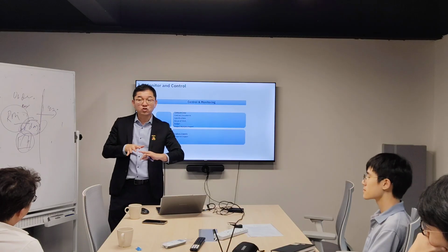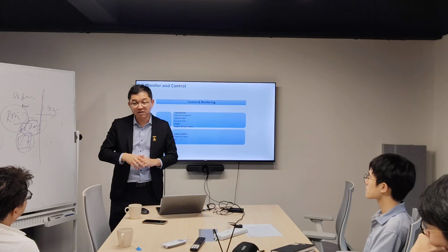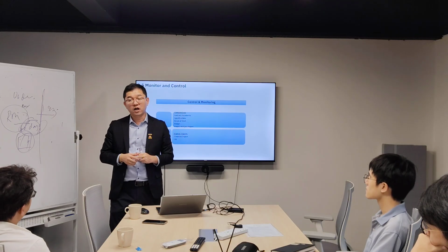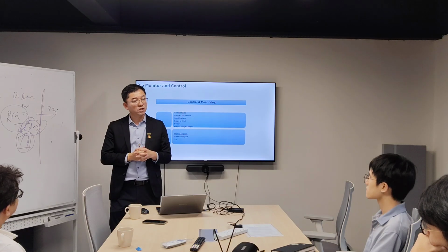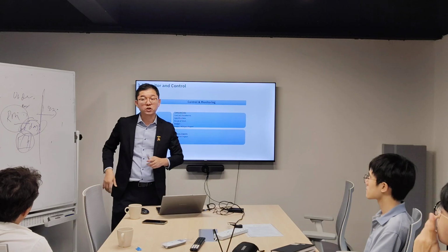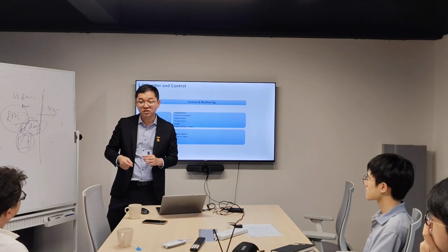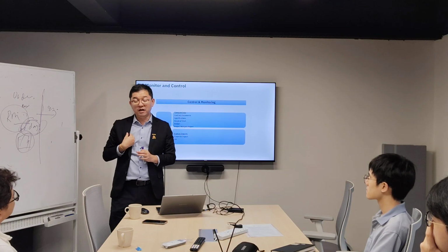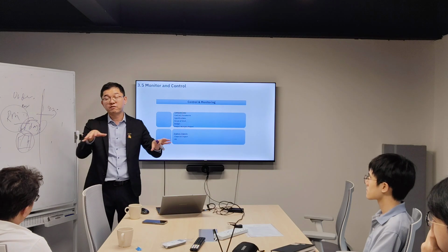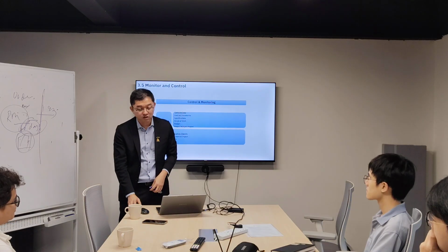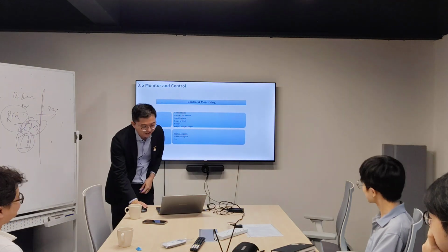Understand? Because certain contracts tell you within 7 days you need to tell the client back what the impact is. Certain contracts say 28 days. Every contract also needs the contractor to write back to the consultant and the client. Some contracts say the client does not need to agree on the cost. As long as the contractor gives feedback to the client, if the client maintains silence, it means they already agree with the cost. So there are different kinds of contract, and you need to read the details. Okay? Get it? Right.